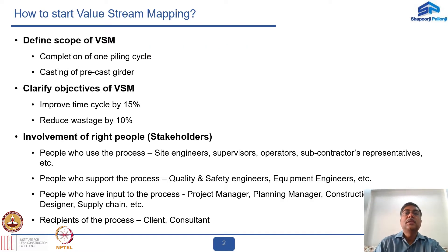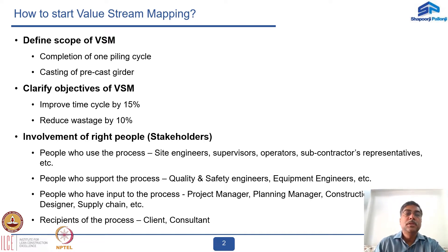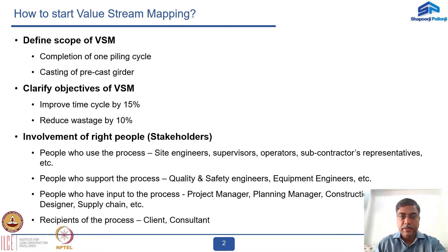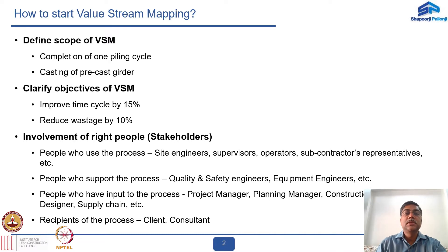Now, how do we start the value stream mapping on the project? The first and foremost important point is to define the scope of value stream mapping. For example, we may want to do a value stream mapping for completion of one piling cycle, focusing only on the activities from start to end of that cycle. Another example could be the casting of a precast girder at site.